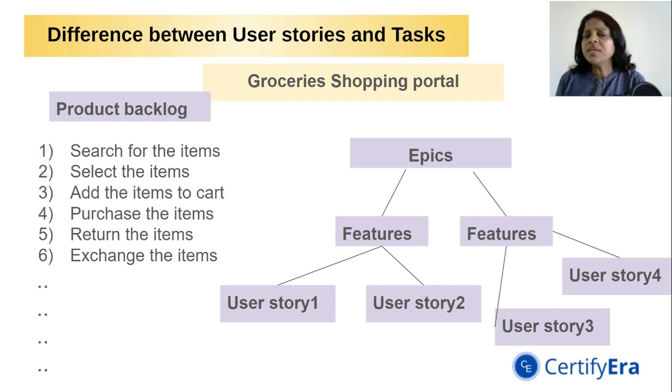So we need to regularly conduct the product backlog grooming session in the project life cycle. In the grooming session, we will try to prioritize the requirements, that is, we will move the high priority requirements to the top of the list, and we try to decompose the larger requirements into smaller ones. We also try to estimate the requirements and assign some size to them.